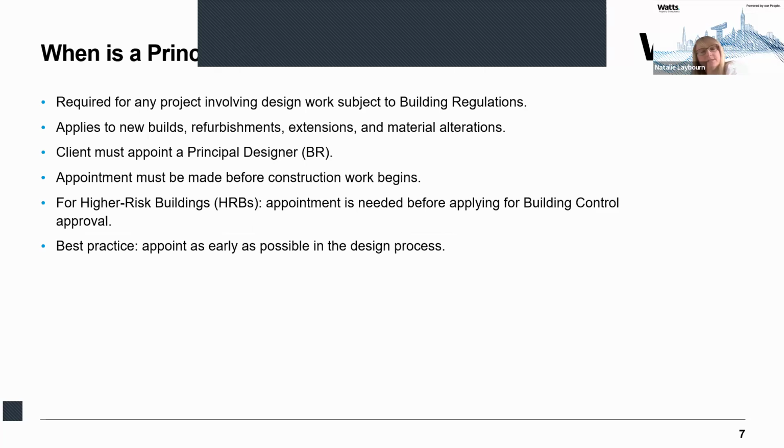So when is a principal designer under building regs required? They must be appointed on any project involving design work that falls under the building regulations. This includes not just new builds, but also refurbishments, extensions, or material alterations, where compliance must be demonstrated. For example, a material alteration could be installing or removing a fire door.